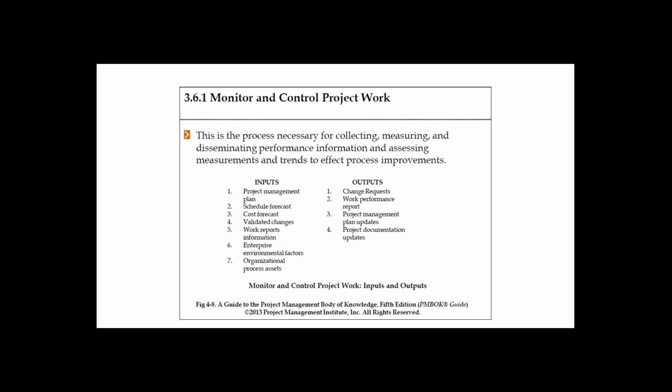In general, throughout the project, you need to periodically forecast the project, like a checkpoint every week or fortnightly, to check whether the project is on track or not. So forecasting is very important, and in the next sessions we will discuss the tools and techniques: how the cost forecast and schedule forecast can be done.